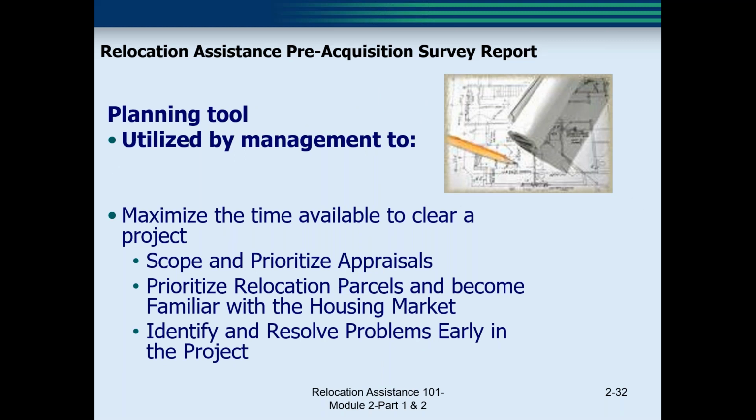So the report compiles the detailed information obtained from the interviews, discusses the project, the chosen alignment, any potential problems, plan solutions, and discusses the timeline to clear all the relocation parcels. This report provides the manager with the information they need to effectively scope appraisers. It could result in the need for updating the cost estimate and seeking additional funding for the project.